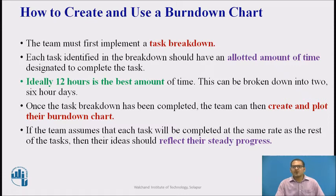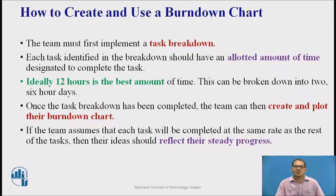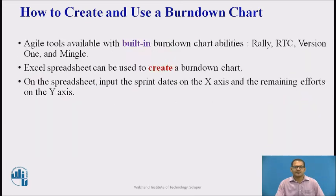Once the task breakdown has been completed, the team can then create and plot their Burndown Chart. If the team assumes that each task will be completed at the same rate as the rest of the tasks, then their ideas should reflect steady progress. There are many Agile tools available with built-in Burndown Chart abilities. Some of these tools include Rally, RTC, Version 1, and Mingle. If you do not have any of these programs, an Excel spreadsheet can be used to create a Burndown Chart.